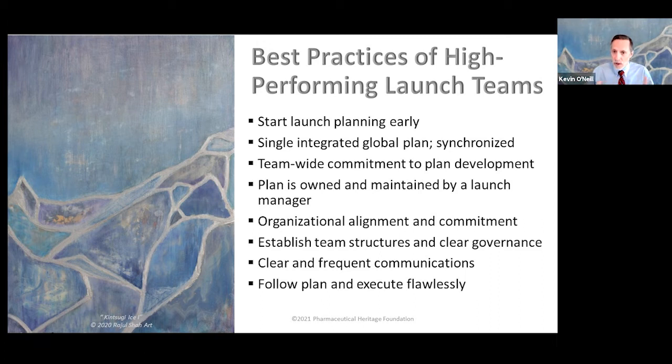Another best practice that we endorse is having a single global plan. Now, that doesn't mean everybody's detailed plan, everything from manufacturing and everything from regulatory or medical has to be in the central plan, but we need to have all the key highlights in our plan that we can have visibility of, synchronize them so that all departments are working together on the same schedule, and then track that plan along the way. The third thing is commitment. We need a commitment from everyone involved to stick to the plan and not run off and do something different that might take us in different directions.